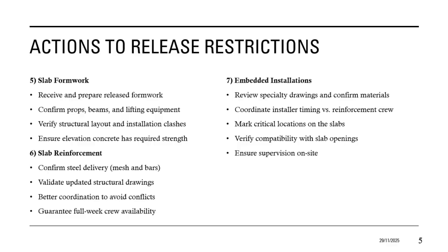Coordination-related restrictions arise particularly in installations that must be embedded within structural elements. To avoid rework or stoppages, layout teams must finalize routes and specialty constructors must confirm compatibility before reinforcement and formworks are closed.